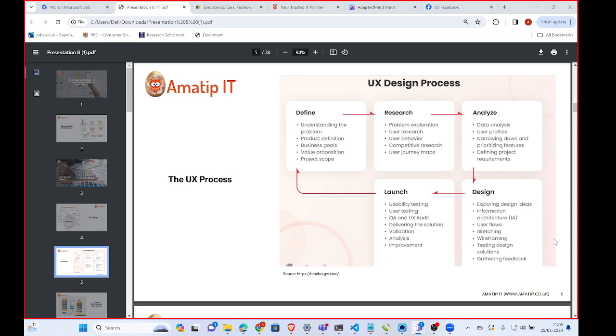If anything goes wrong and we need to change the entire design, we can easily cancel the wireframe and go back to our sketching stage, perfect everything, and move back to wireframe. But if you jump from wireframe to prototype, the effort and resources required to create a prototype are much greater than for a normal low fidelity wireframe.